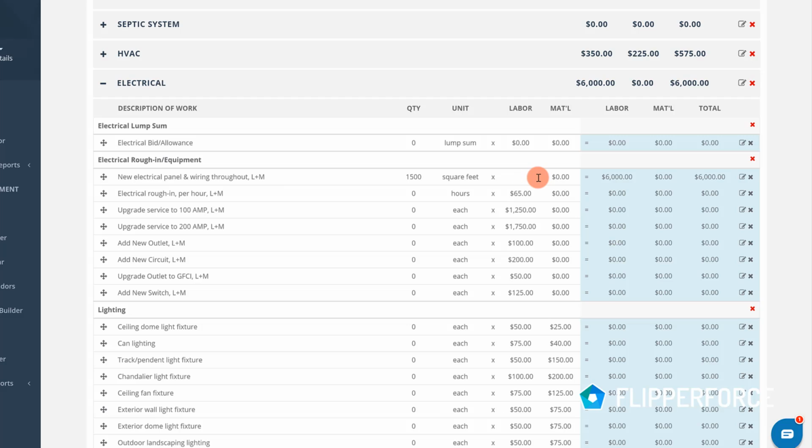Now we actually got a quote and it was quite a bit cheaper than that. It was maybe $3 a square foot. So that was $3 a square foot over 1,500 square feet. That's to rewire the property. That's to install a new service to the property. So tearing out the old 100 amp panel, upgrading the service to a 200 amp panel, replacing all the circuits and rewiring the house, and then running a new service from the service main to the property. So that was included all for that $4,500.